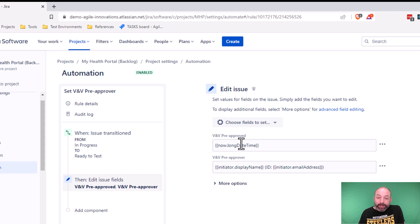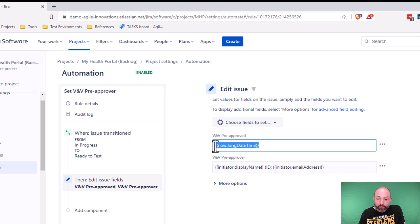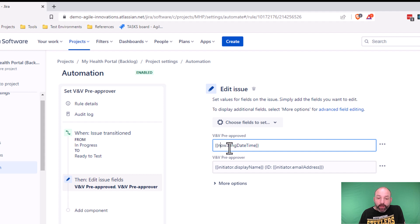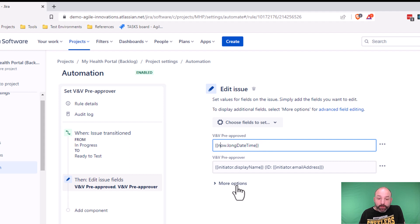To capture these values, you can see that we're using a feature called JIRA smart values. This JIRA smart value takes the current timestamp. That's what now means and formats it as a long date time string. There's lots of different time formats that you can use here.